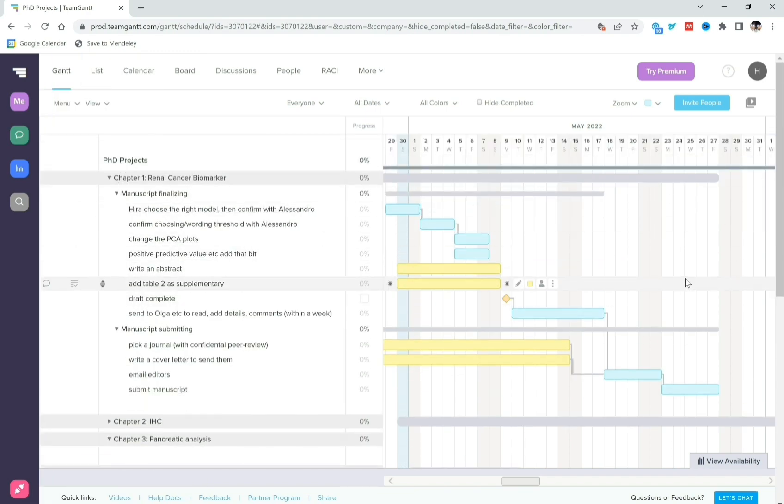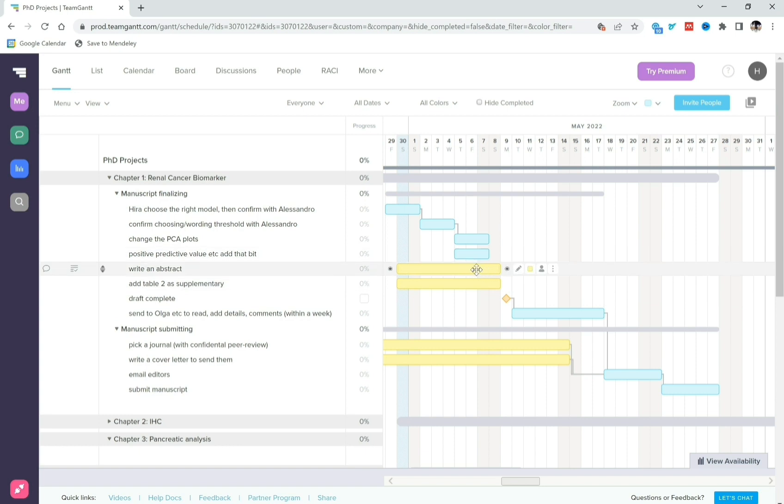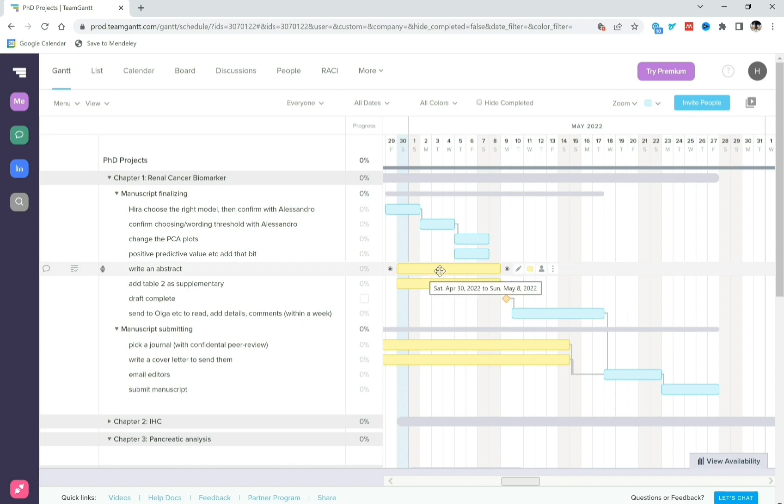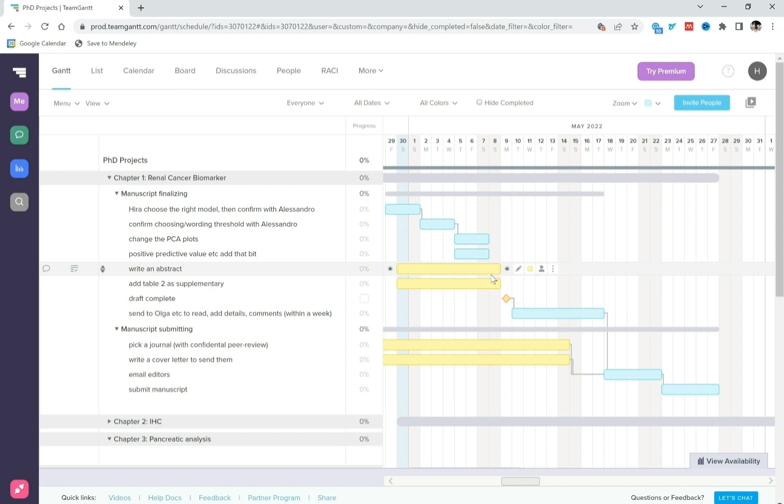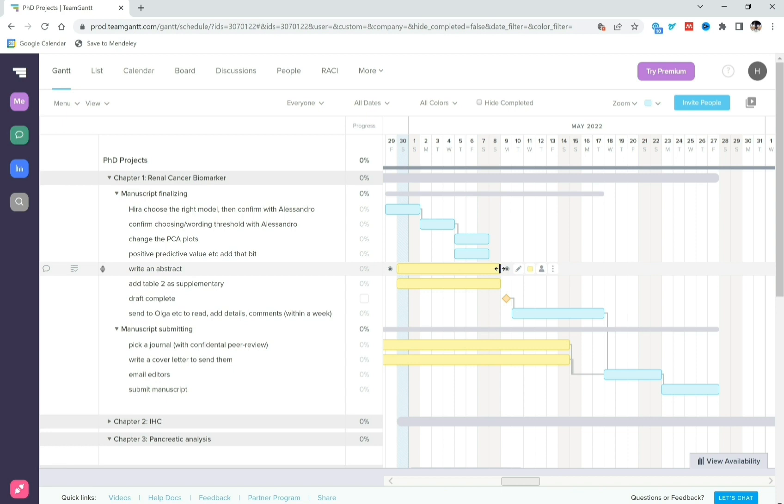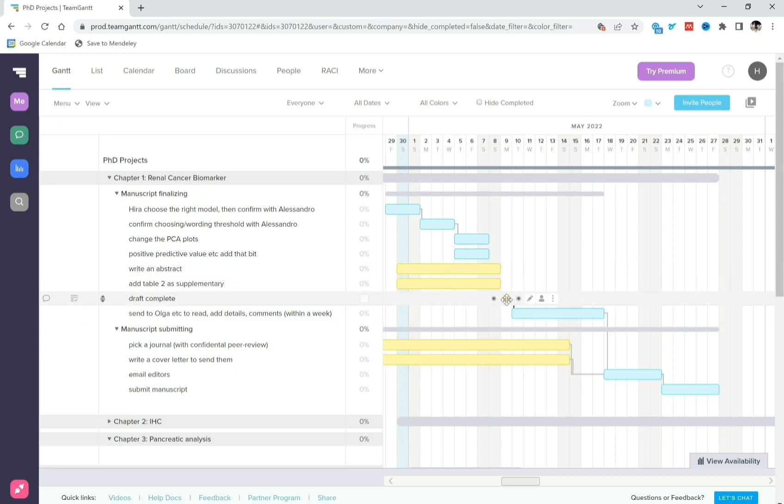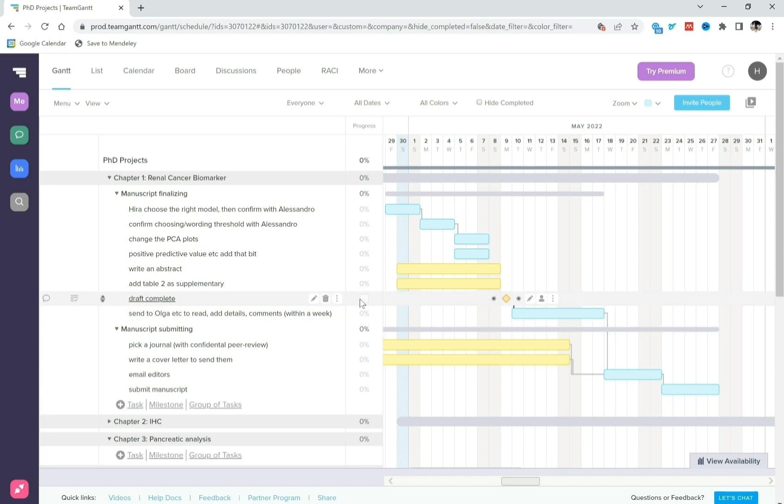So I, you can also change colors. So over here for example I need to also write an abstract for the paper and this I'm not waiting for anybody to do. Therefore it's an independent task and I've changed the task color to yellow because this reminds me that I can do this task anywhere from between now to about this point. And the reason I set this point is because I want the draft complete on the 9th of May and so I've actually added a milestone. So over here you can see that you can either add task or milestone or a group of tasks.